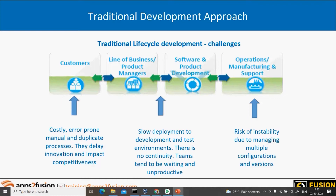In the designing phase there are two types: high-level design and low-level design. Once you're done with designing, you go to coding. When coding is frozen, you go to testing. When testing is frozen, you go to release. Each phase is sequential — you cannot start the next phase until the previous one is completed. That's a very long cycle, and if there's an error in any phase, you have to go back to the beginning and redesign, recode, and retest.